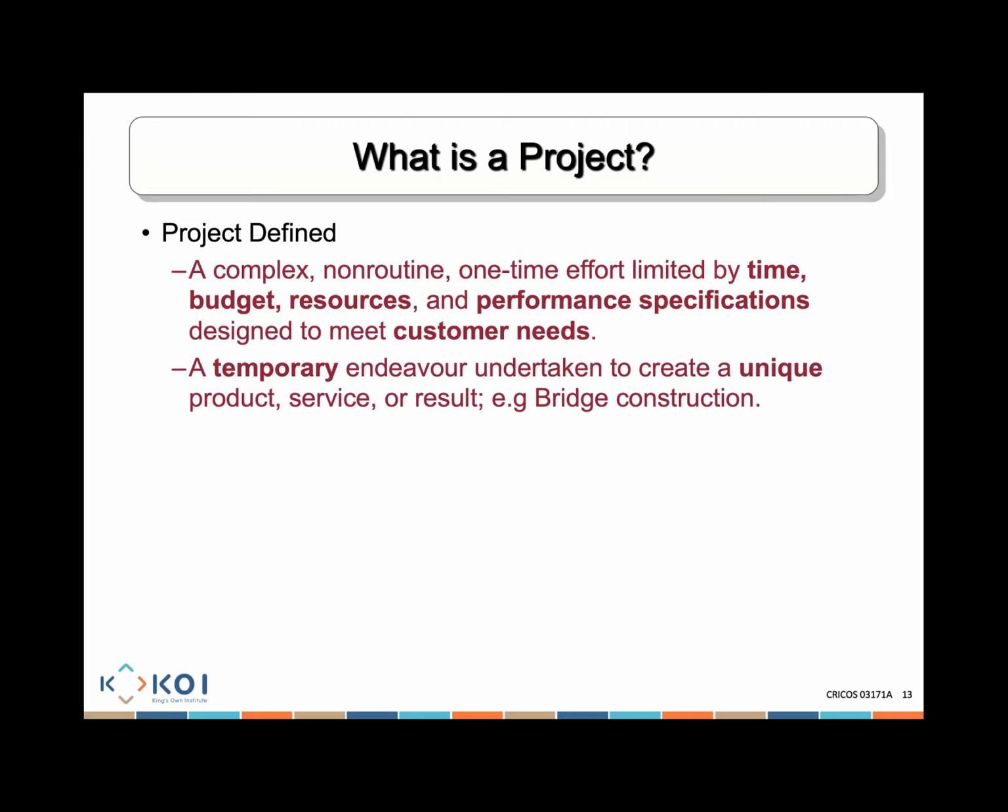Building is the primary project. Building is a project. Why is maintaining it not a project? It's part of maintenance after the project. It's part of normal operation, maintaining something over and over again.